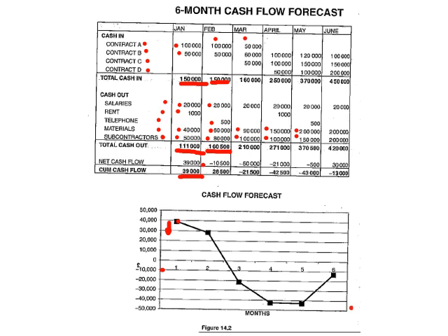graph, and very easy, you can see 28,000. This is what your cash flow is. So you can see after month 3, it's still you losing 50,000 rand with regard to your income. So there you see you actually going into a negative cash flow. From here on, you need to have credit to actually finance your project.